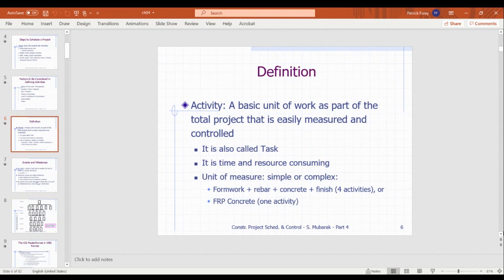There are, I don't know, 50 different locations for ComEd in slightly different configurations doing different jobs. But as a whole, we would track the requirements for capital projects, which is what I worked on, meaning you're either adding something on to an existing building that increases its value or use, or you're replacing an old thing with a better, new thing. For capital projects, they would have an assignment of, okay, we have 12,000 man hours available in the fourth quarter for capital project work. Inevitably, we'd have five times as much need: we have 60,000 man hours of projects going on. So what are we going to do here?